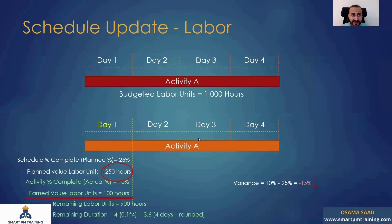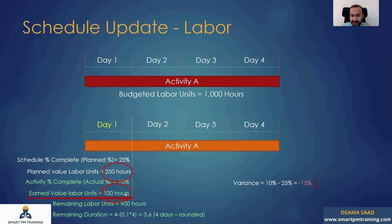It doesn't matter if you hire 1 or 15 or even 100 — I care about the progress, how much was achieved, and how much converts to earned value labor units. The 100 earned value units cannot be called 'actual' because actual could be 1,000 hours spent with wages on site. But I don't care about that number. Earned value labor units is virtual, but it's a good indicator to reflect progress.